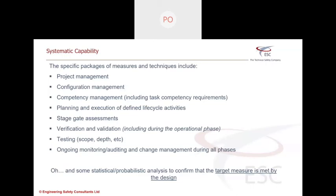The stage gate assessments give you alignment, if you do them more often, it's an increased burden, but your alignment's likely to be maintained closer to the bone. If it's less often, it's more likely that closer to operational status, you'll have more areas that you might need to address. And that past that operational phase as well, looking at, is this what I thought at the beginning, does it reflect the reality now? Now, testing, it's a bit like the message for COVID-19, testing is key. Whether it's testing of the equipment, testing of the assumptions, testing of the estimates, testing of the practices, that needs to be happening. Whether it's in form of an ongoing monitoring auditing process, whether it's part of your change management, whether it's all of those, it needs to continue happening. Without that, it will not allow you to validate the benefits of what you have.